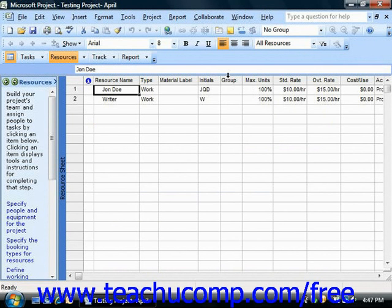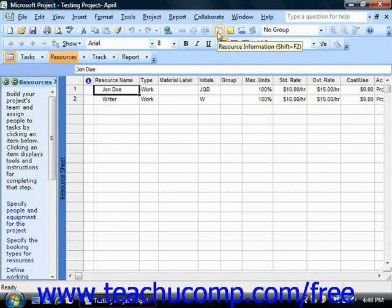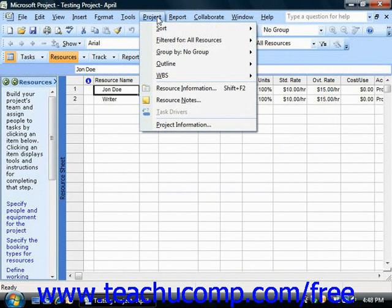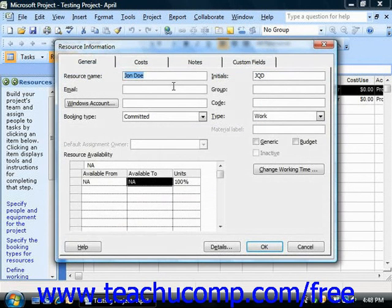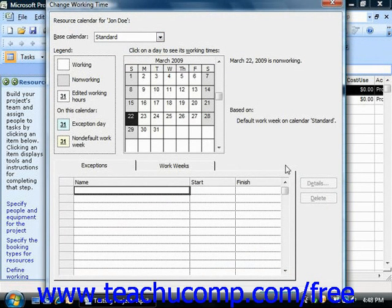To do this, first select the row within the Resource Sheet view that contains the work resource whose availability schedule you wish to edit. Next, open the Resource Information dialog box by either clicking the Resource Information button in the standard toolbar, or by selecting Project and then clicking on Resource Information from the menu bar. In the Resource Information dialog box, you can click the Change Working Time button on the General tab to open the Change Working Time dialog box.